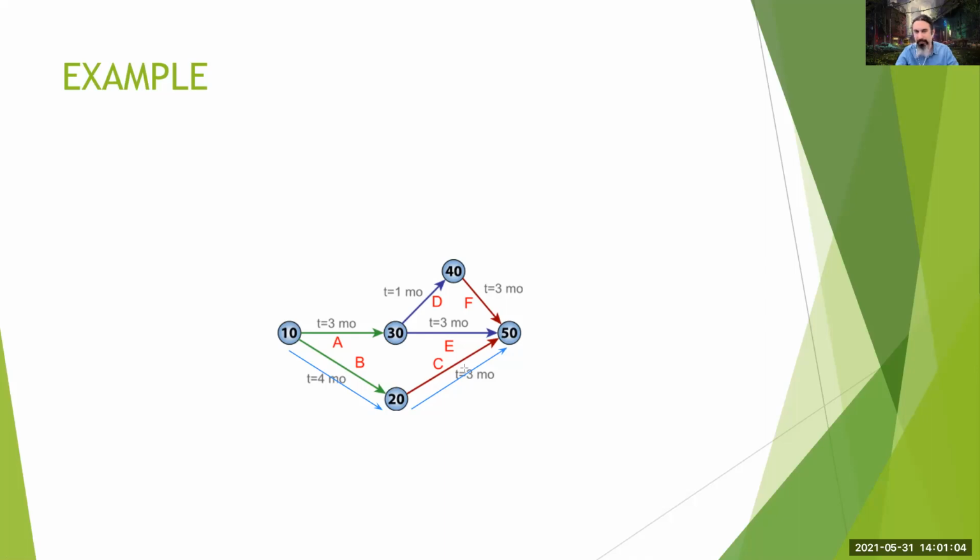And it's asking us what's the probability that the project ends in a time of 9 units. So we know that the average is 7, the variance is 36, so the standard deviation is 6. And it's asking us the probability of the time we are spending being 8 or 9 or 10, whatever. What are we going to do?